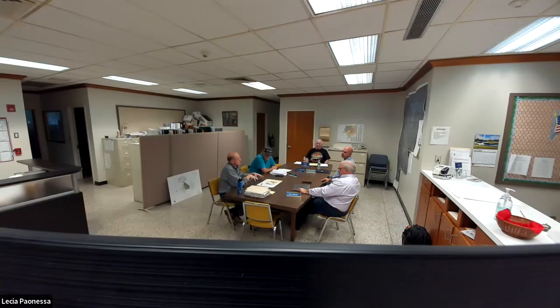And let me go back another step. The most recent contingency adjustment was Newfield was at 400. We needed money for some extra costs that Doug had on moving stuff out of the way for the storage area, and we needed $20,000 for Fryer to do construction administration. So it was kind of my call. I said, if we're gonna ask for another contingency, let's ask for 50, not the 20, and we have 30 left over. So right now there's an owner's contingency of $30,000 that's free of any vendor. If anything pops up that's lower level, it can be handled.